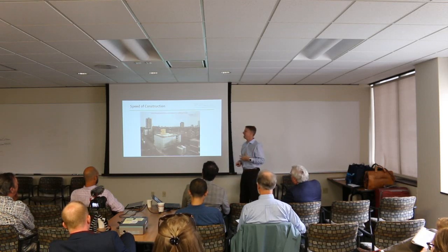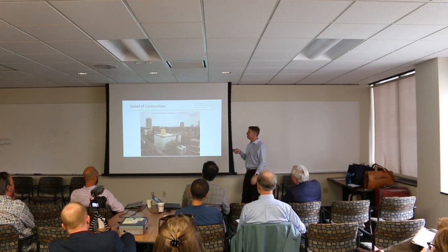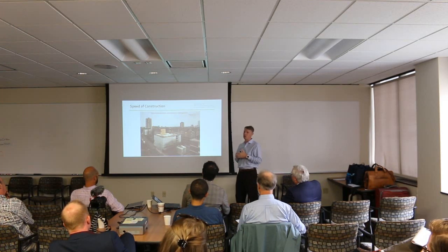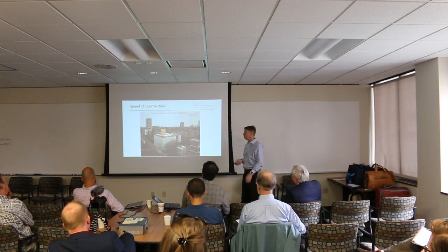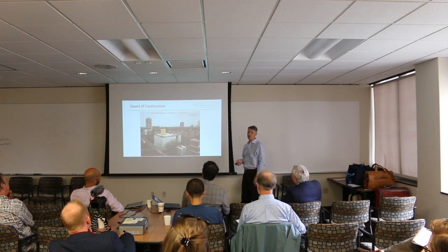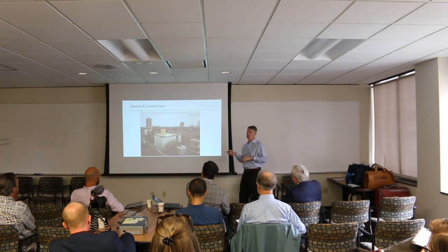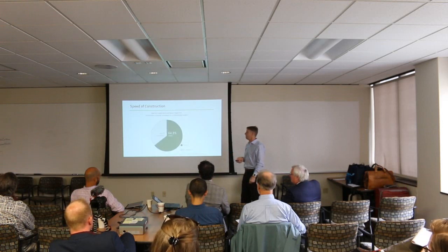So we've actually had a good transition, but there's a bunch of projects out there. Basically these mid-rise projects are doing a story per week at a normal pace schedule with a crew of 2 to 3 people. A concrete job is easily a dozen people. And this is done at a story per week with 2 to 3 people. So you start running those numbers, and it makes a difference.